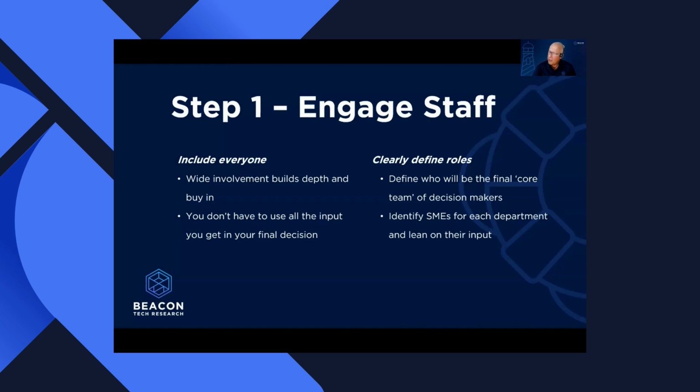And I would also recommend that you start with a survey of your entire staff and ask them, what do they like? Just a simple, short, few questions. What do you like most about the current system? What do you like least about it? And here's the winner for it. If you could have 1 to 3 features in the new system, what would those be? And please be specific. Not being our old system is not a helpful feature of the new system.